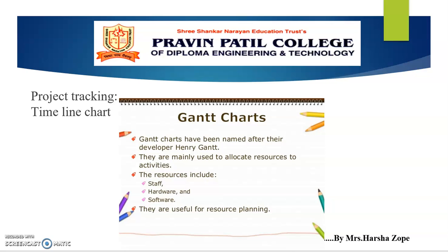There are some activities conducted during tracking of the project. First is to conduct periodic meetings and then evaluate the results of the project reviews. Then compare the actual start date and scheduled start date of the project tasks. Determine if the milestones of the project are achieved on the scheduled date. Then meet informally with the software practitioners. Then assess the progress of the project quantitatively.